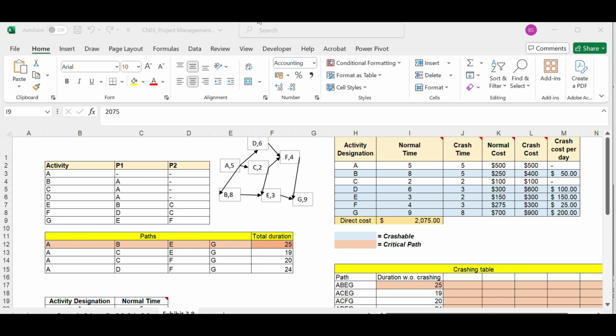Now, there is a solution for the adequacy challenge. The solution for the adequacy challenge is critical chain project management, also called CCPM. It is also called resource constraint scheduling, RCS. It works on priorities and allocates the resources. It identifies the most critical resource as a bottleneck and prioritizes those activities with minimum slack. It reduces the number of projects done in parallel.